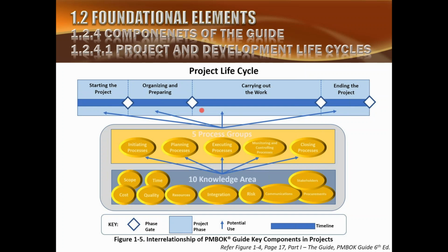So this defies our waterfall model. This is not a waterfall model. So the thing which we are looking at right now, this is the waterfall model. And in the waterfall model, generally we have the scope amply clear. When scope is not clear, when it is highly doubtful, only then will we go for the agile kind of thing, an iterative life cycle.